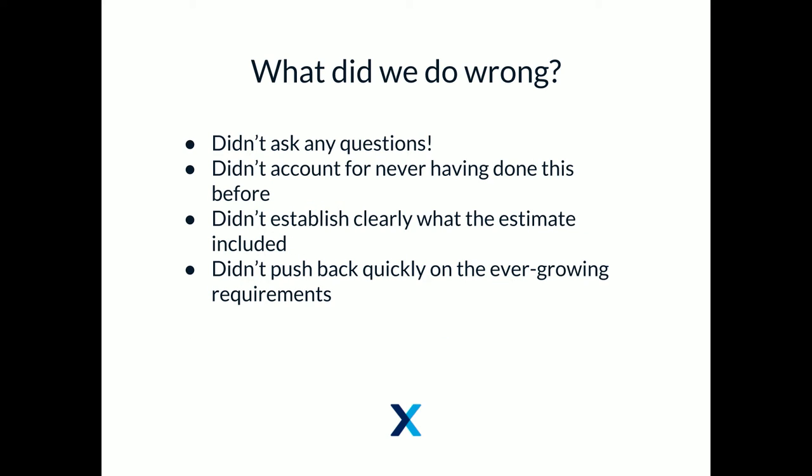So what did we do wrong here? Well, first of all, it doesn't seem that we asked any questions whatsoever. We want ReadSpeaker. We'll add the ReadSpeaker module. That's what we did. We'd never done ReadSpeaker before, so we had no idea what things could possibly go wrong. Based on that, we should have probably assumed it wasn't going to be just a simple case of adding the module. And also, we didn't specify to the client that what we were estimating was adding the module.